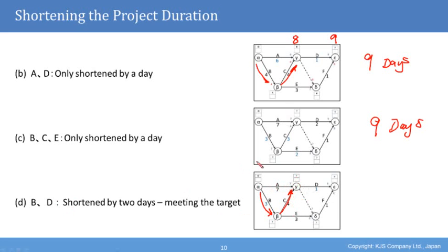Now we say that we also shorten D. If D is shortened from 2 hours to 1, then that means that since to get from beta to delta takes 3, we are at gamma and delta at the same time. We're at gamma and delta at 7. If D and F take the same amount of time, then we can finish simultaneously.